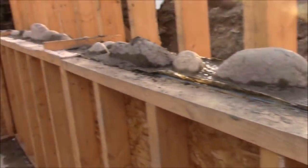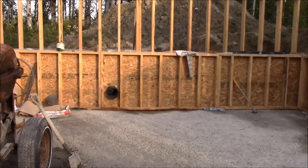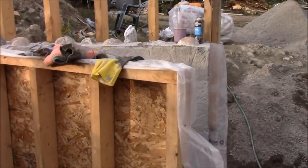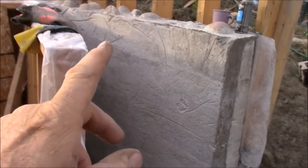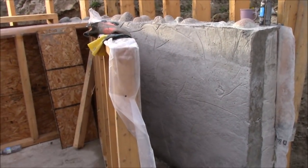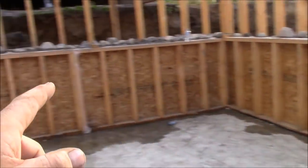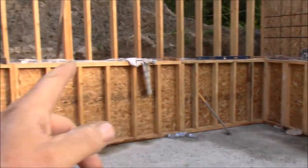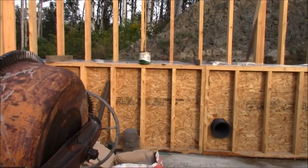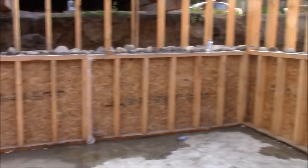So once we get that done, I'm hoping 2 days on that and we'll have it done. Really, when Heather and I first started, we'd do it faster. But that first day, it took us 6 hours to do that because we weren't going at it really hard. But 1 day on that, 2 days on this with my cousin helping, and then it should take us 2 days on that with Heather and I. So that's 5 days in total to do our concrete.